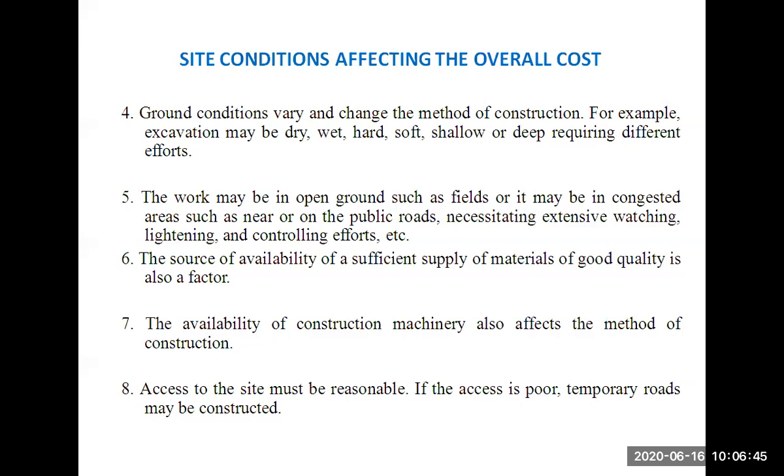Because in case of weak soil, we have to invest an extra amount for soil stabilization. And if our base is also weak, made of weaker materials, then we have to stabilize our base also. So for ground improvement techniques, we have to add an extra amount, and that will hamper our overall cost of the project. So ground conditions definitely affect the overall cost of the project.